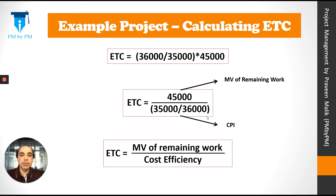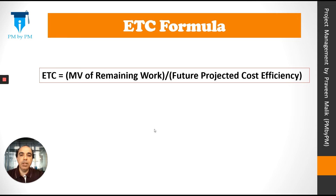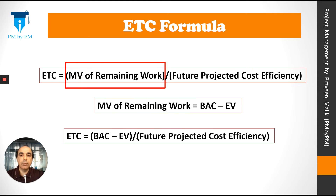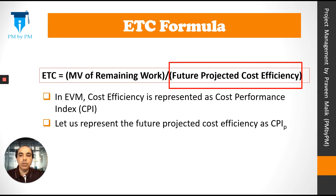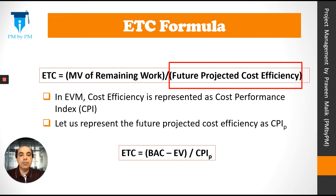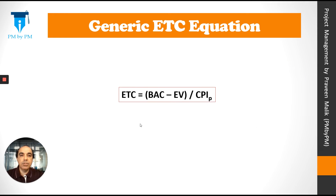This is our current cost efficiency, but it may change in future. So let's rewrite the ETC formula as: ETC equals MV of remaining work divided by future projected cost efficiency. Since MV of remaining work equals BAC minus EV, the formula becomes: ETC equals (BAC minus EV) divided by future projected cost efficiency, represented as CPI_P. So the generic ETC equation is: ETC = (BAC − EV) / CPI_P.